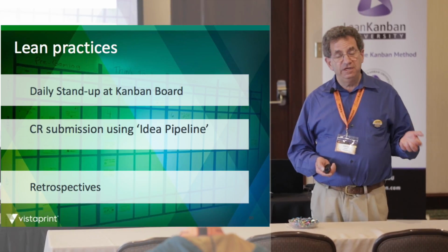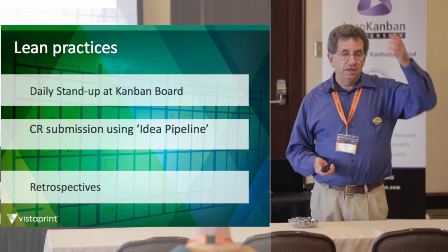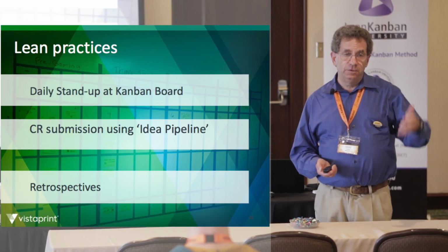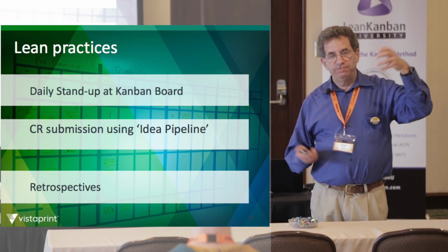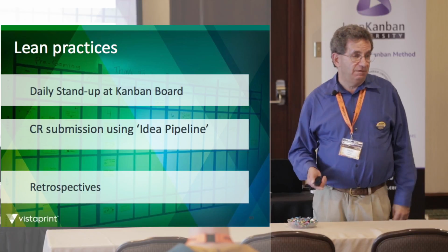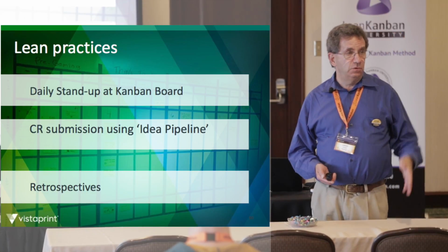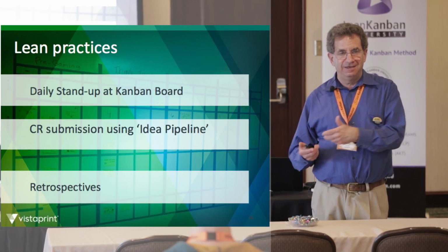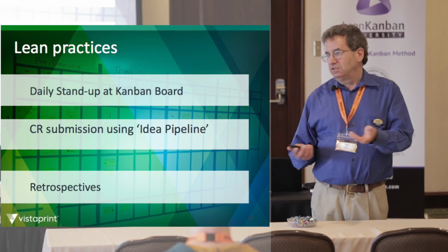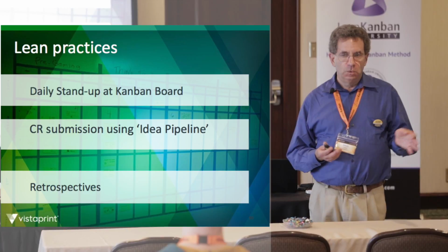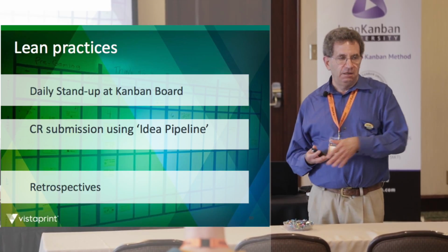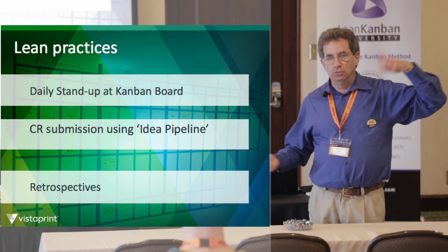So 6 weeks ahead of time, they would create tickets and go into the backlog for every single item 4.5 months out in advance. And so the backlog was enormous, and if that was all in the on-deck column, if anybody was at David's talk last night, when he separated out next from backlog, when we separated out on deck from this idea pipeline, it made the world of difference.